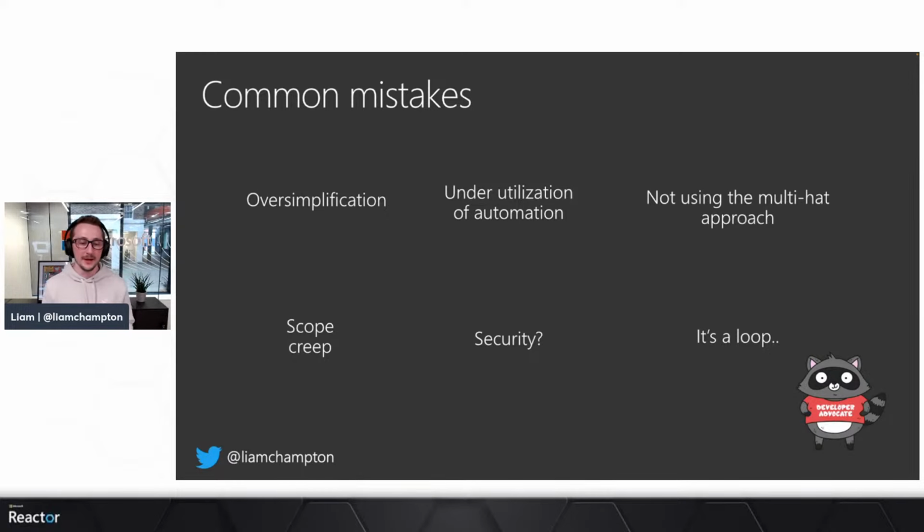And then finally, it's a loop. People forget and don't really realize it's a loop. So once you've done it once, you go round and do it again. You have a retrospective: what went well, what you could do better, what you're going to do next, taking customer feedback, and how you can plan that in. It's all about sprints and getting better and iterating over a loop.